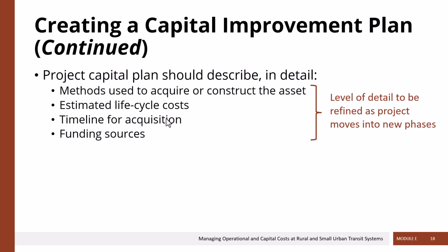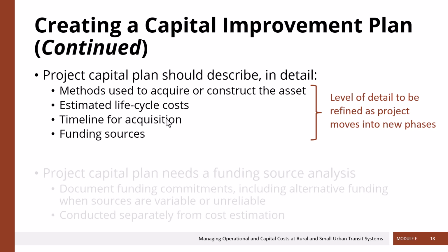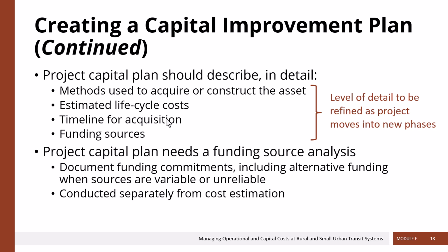Now, the level of detail in each project capital plan can be continuously refined and updated, with there being more precision and more detail as the capital project moves closer to implementation. Any sort of project capital plan definitely needs that funding source analysis. Where is the money going to come from? Who's paying for this? And how do we get to that number?